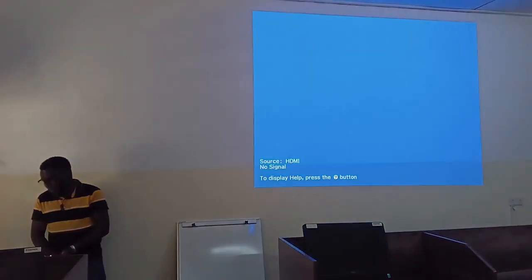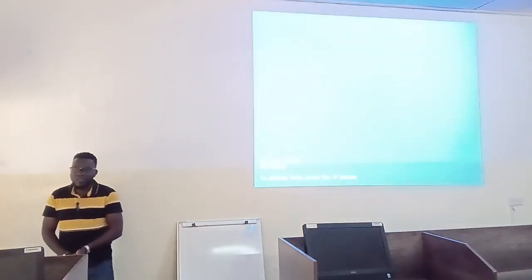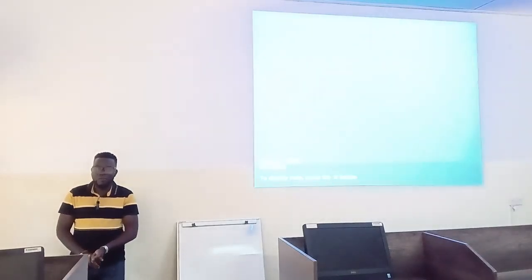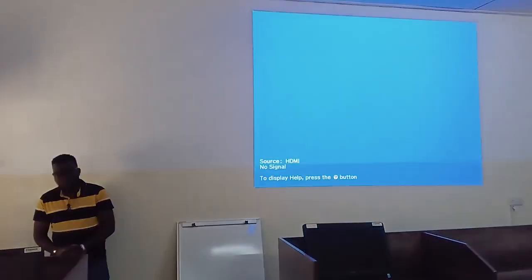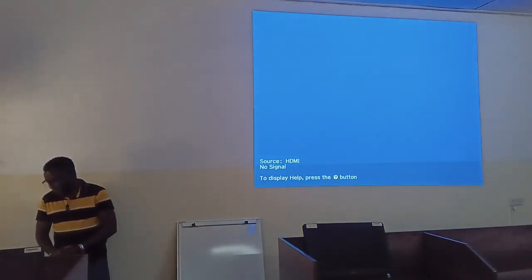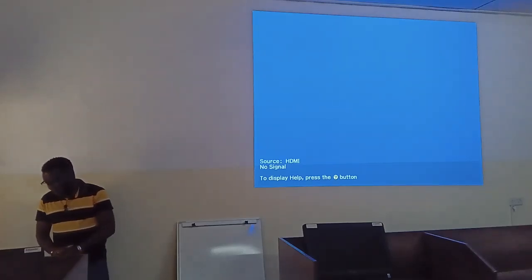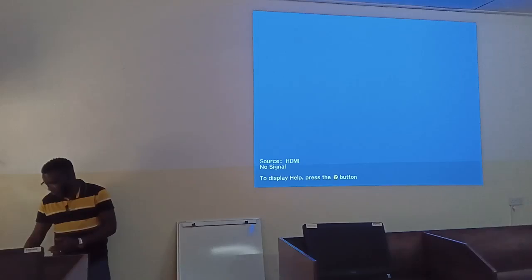And we were saying, for a contract to be regarded as sound, and for you to have the confidence that with this contract we are going to successfully get what we want, at least it should be a contract that can be enforced. Now, for a contract to be enforceable, we said at least it should be in writing. And apart from being in writing, at least it has to be signed by both parties. We also saw this one.